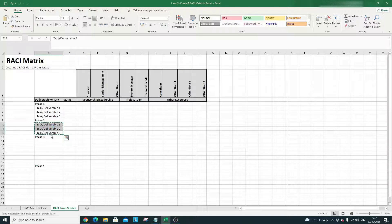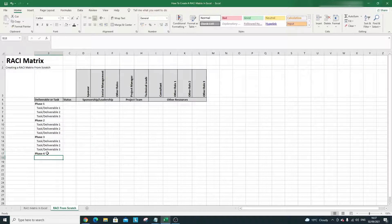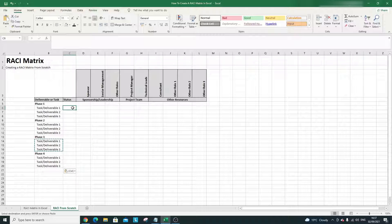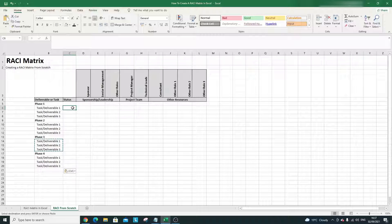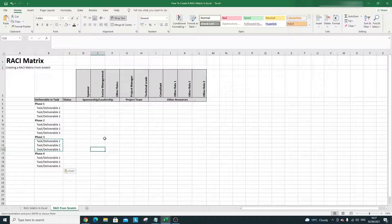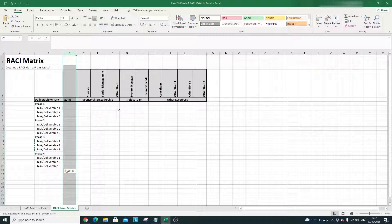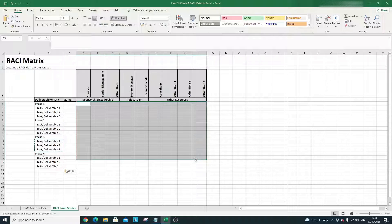We're shaping up nicely. For the Status column, some examples could be In Progress, Completed, On Hold. What we're going to do is select the entire Status column and set up Data Validation. That essentially means you're limited in the options that can be selected. We'll also use Data Validation for the rest of the RACI matrix to limit entries to R, A, C, and I — more on that shortly.